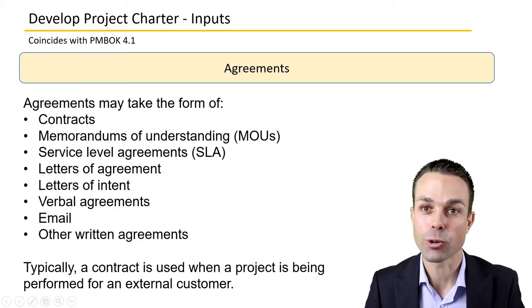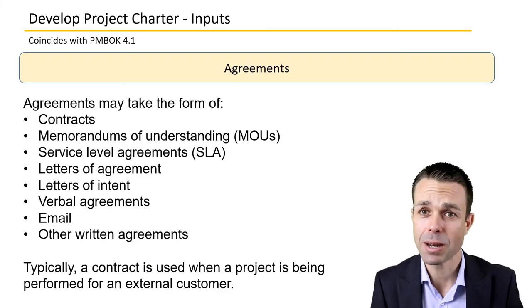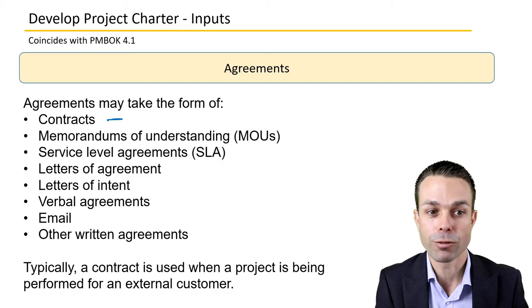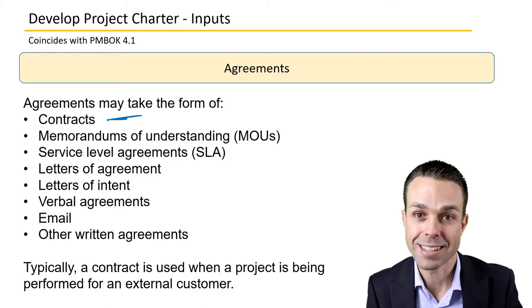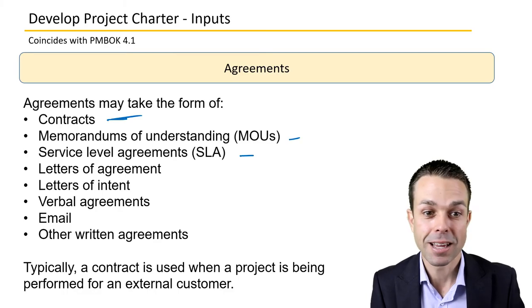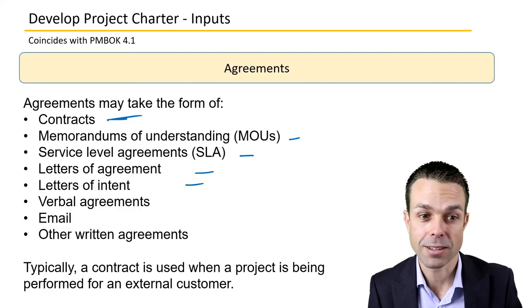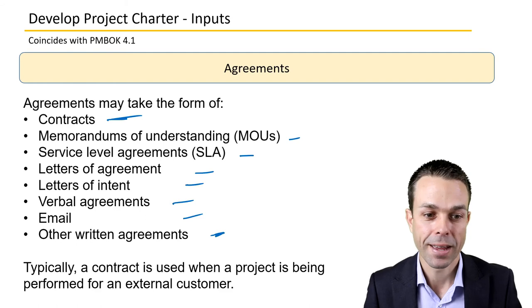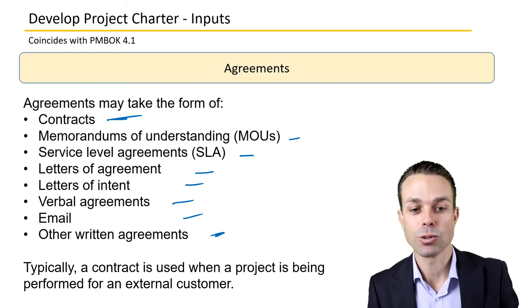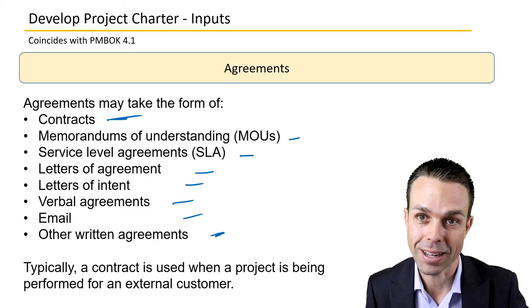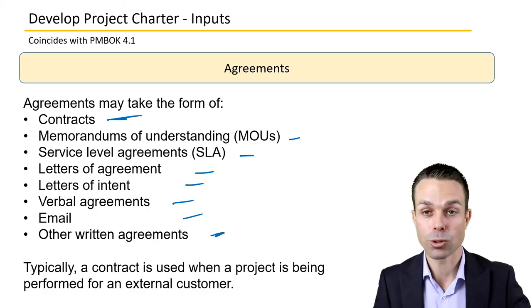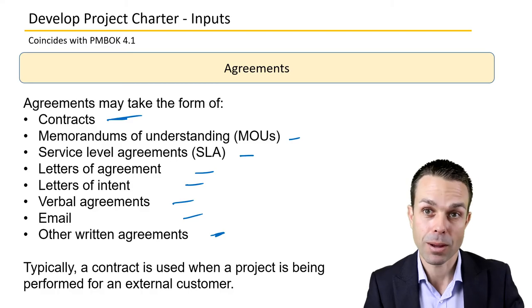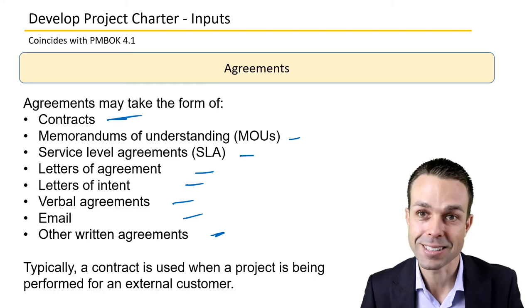We're also looking at agreements as an input into our project charter, because someone has to agree to make this project happen. It might take the form of contracts, memorandums of understanding or MOUs, service level agreements, letters of agreement, letters of intent, verbal agreements, emails, or other written agreements. Typically, a contract is used when a project is being performed for an external customer or when the two parties are separate organizations.